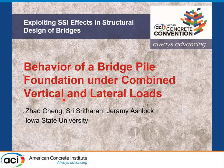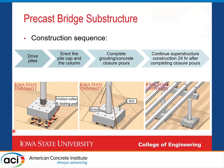The topic involves accelerated bridge construction. ABC work has been quite a bit used around the country, focused more so on the superstructure and maybe some limited amount on columns. Our focus was to take this to the next level and look at substructure construction. The idea, with input from Iowa DOT, was to drive piles and within 24 hours get to a stage where we should be able to place the bridge girders — typically precast — on top of the bent cap.